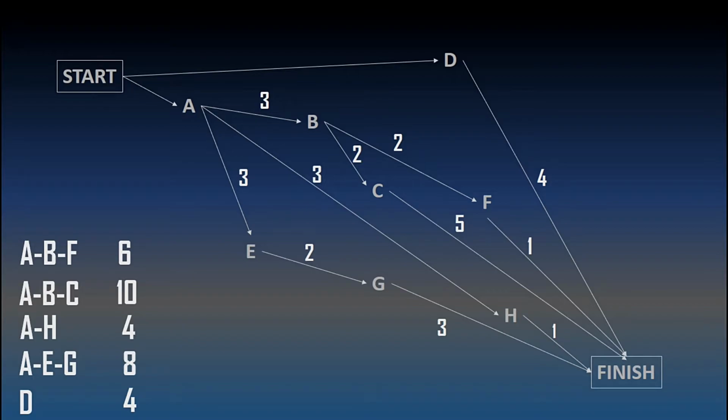Even if you wait 4 weeks to start task H after finishing task A, it is not going to delay the overall timeline of the project. But you cannot slack off on tasks B and C. Even after completing task A, you can slack off on task B, but not C. A, B, C is the critical path in this project.